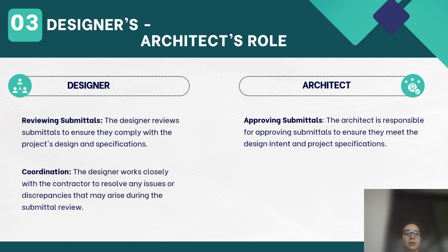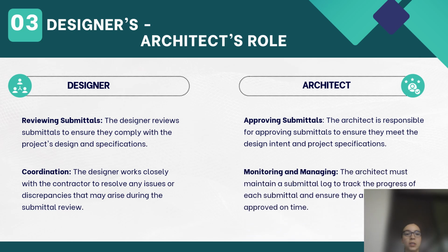Coordination: the designer works closely with the contractor to resolve any issues during the submittal review. And monitoring and managing: the architect maintains a submittal log to track progress and ensure timely reviews and approvals.